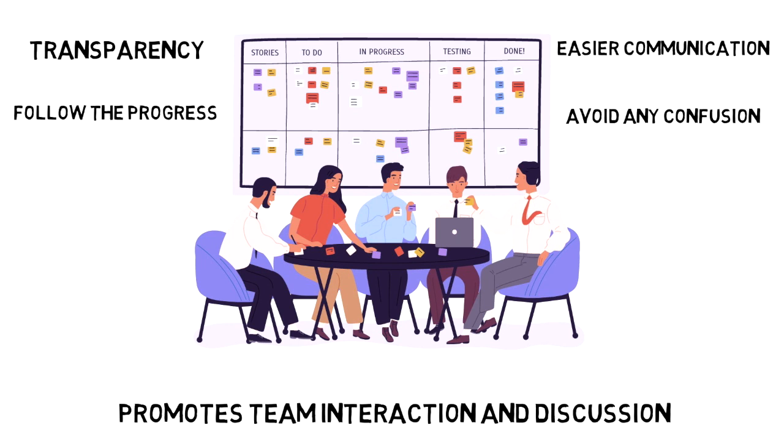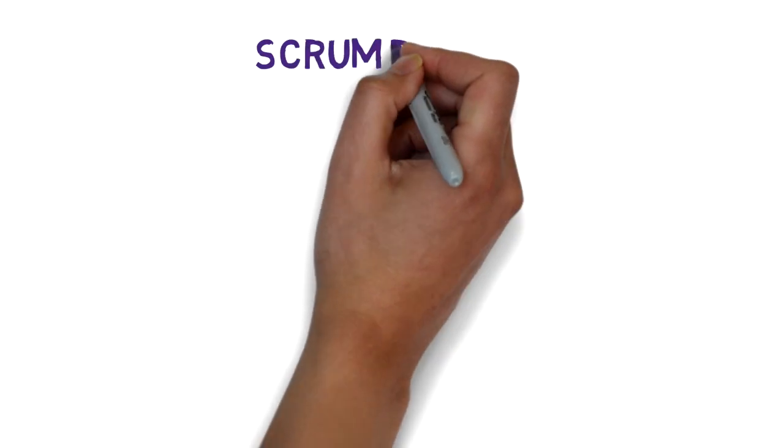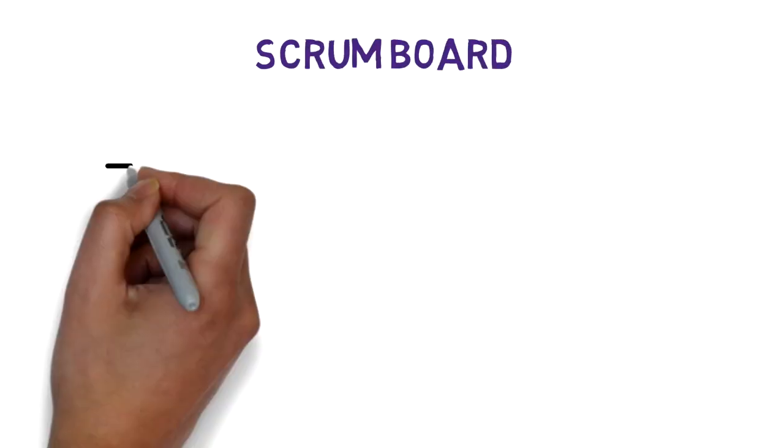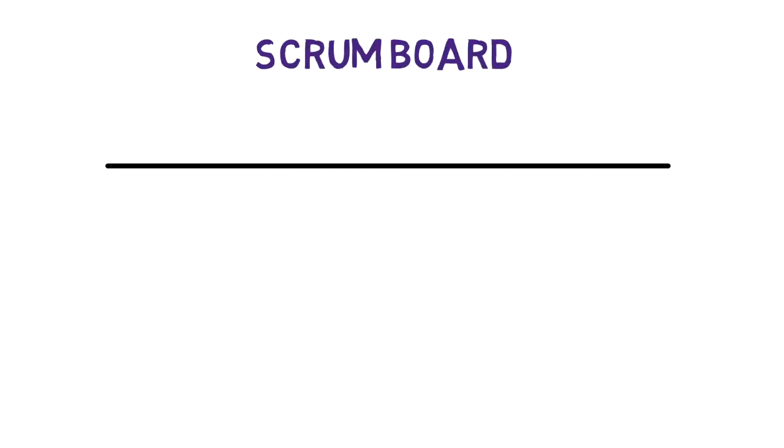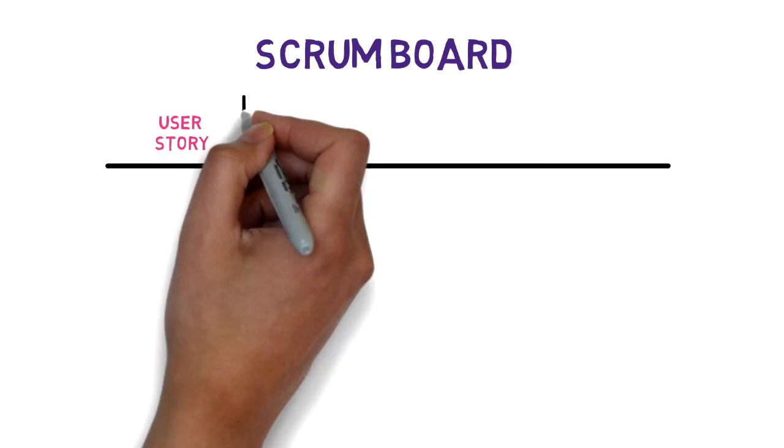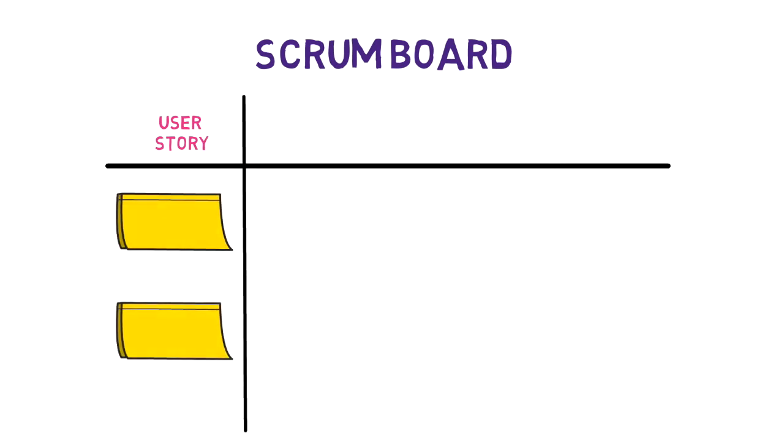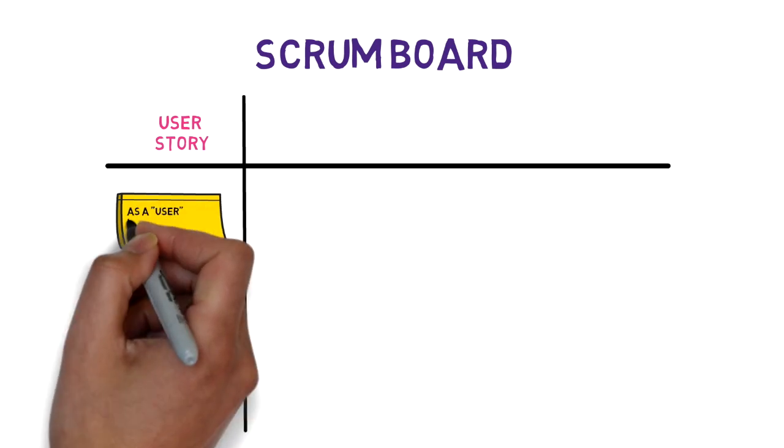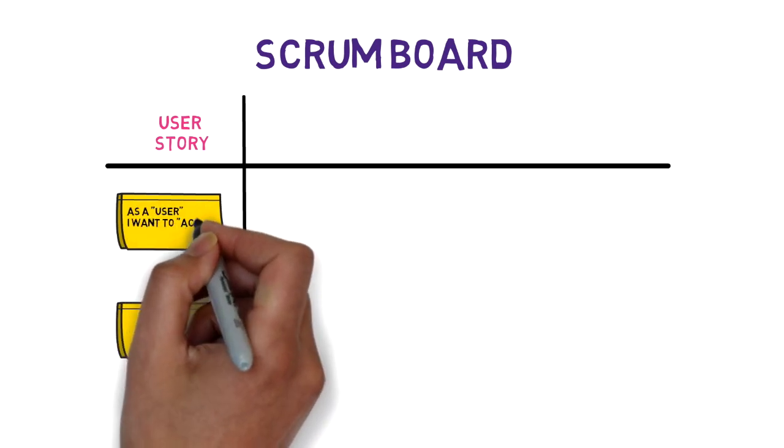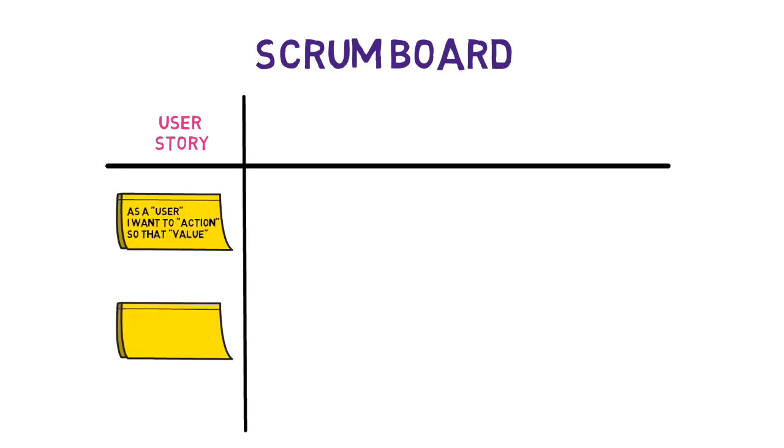If your team is working with Scrum, then at a minimum your Scrum board should be organized into four columns. The first one is the user story column. These are the user stories in the current sprint backlog. These backlog items are written as user experiences with your product: as a user I want to do an action so that I can get a value.